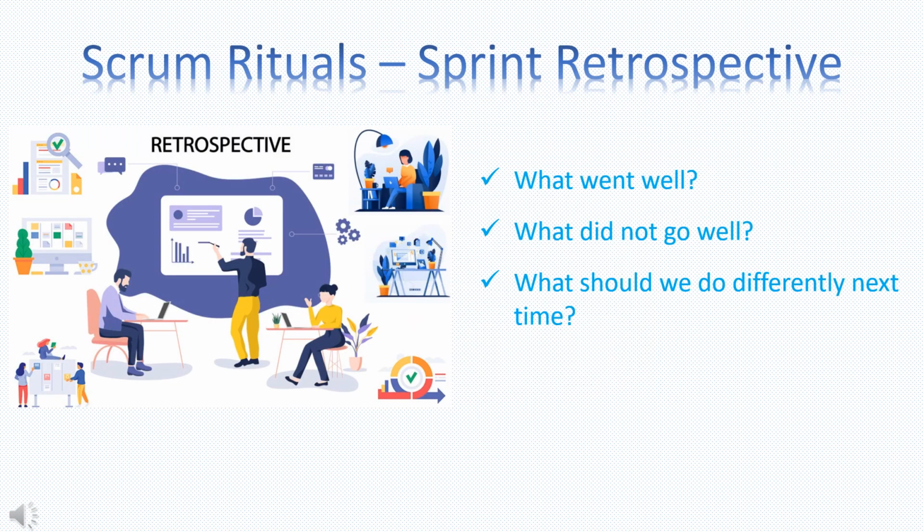The sprint retrospective is an opportunity for the Scrum team to inspect itself and determine how best to implement improvements for the next sprint. This is a time box event with 45 minutes allotted for each week of the sprint duration. So, for 2 week sprints, the duration would be 1.5 hours.